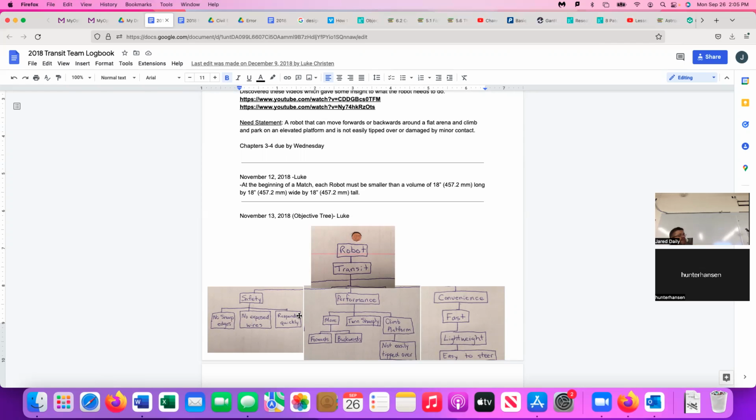And then maybe you're going to have to revise your design after the client feedback. And then you're going to build your prototype. You're going to test your prototype. You're going to fix your prototype, for the things you find wrong with it, or improve your prototype, whatever. So those are all tasks that would be included in a design process for something.